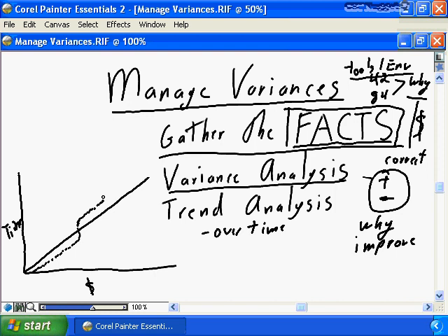our project baseline. What this is telling us is at the beginning of the project, we were in very much the minus situation. We were delivering our project under budget. It may mean we didn't have our full complement of team members as per the plan. It may mean we didn't bring in the supplies and materials quite as early as expected. And then all of a sudden at this point, our catch-up point, we have brought in the additional team members, we have brought in the additional supplies, and we're now very much in a plus situation.